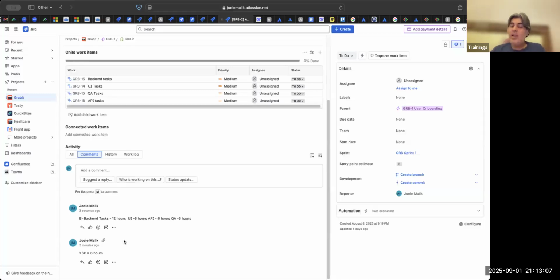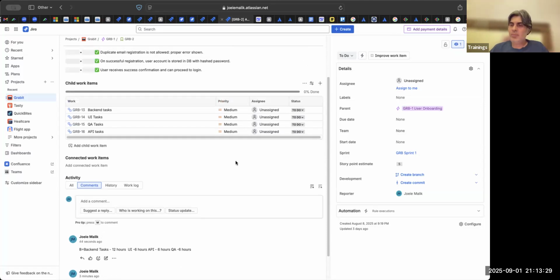So this is murder of agile. This is not how you are supposed to do it. But if the organizations are forcing you to use hours, they want estimations to be done in hours, they want to track people in hours, say, yes, I have been doing it and I am very comfortable with it. How do you do that? See, we divide the story into a number of subtasks, and then each subtask we estimate in hours, and then we have a discussion, kind of a planning poker, but on a task level. So if there are 4 backend developers, they will have a discussion between them, and ultimately they will come up with one number. Same for all other folks.